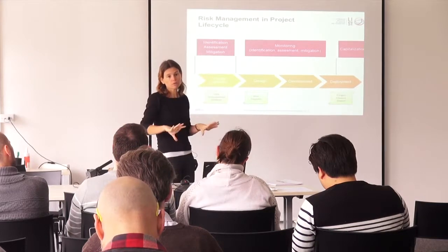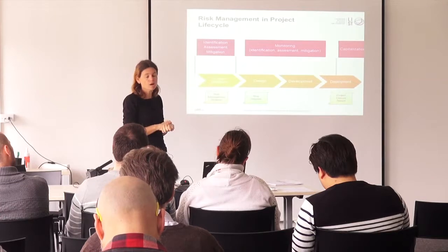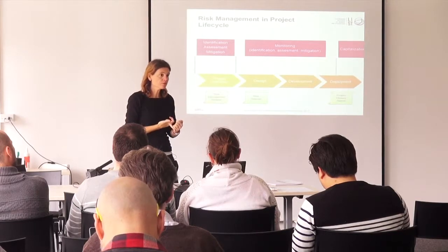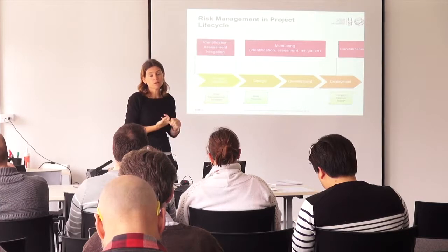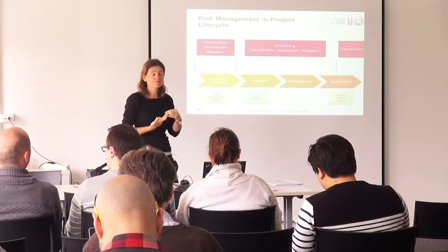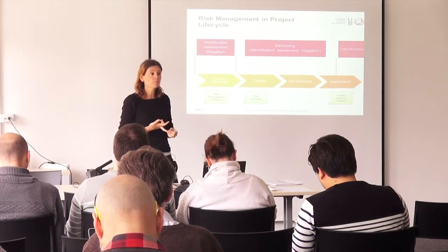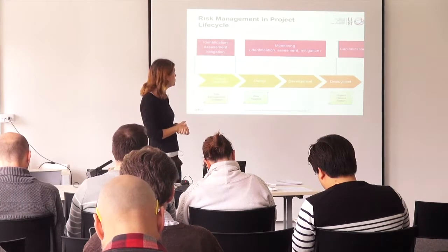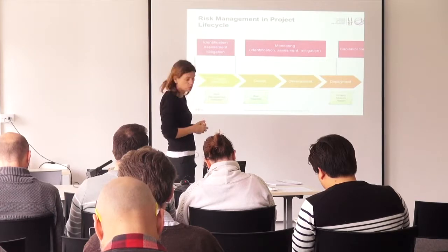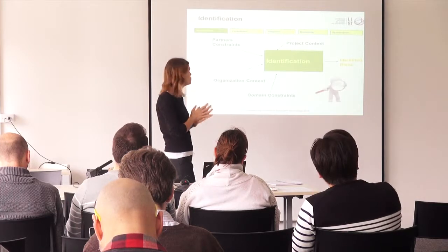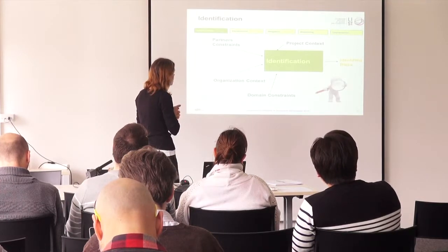And there in that document, it's a good practice to have one piece, one paragraph, one page, to think about risk. Were there some risks that I did not identify that occurred during my project? Have I been efficient in the way I have implemented some mitigation actions? Anything that you can learn from what you did regarding risk management during the project could be done there at that time. Okay, so let's go through the different steps.